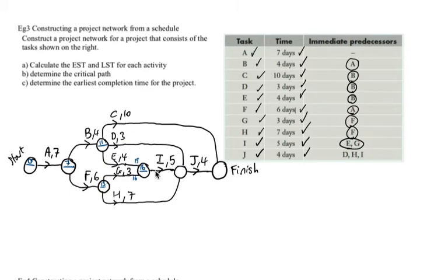Okay, this node here has either 21, 20, or 14. So we're going to choose 21. And our last node is either going to be 25 or 21. So we choose 25. Then in red, we do our back scan. 25, and this way will be 15. We can't complete that one yet because we've got this going in there. 25 minus 4 is 21.